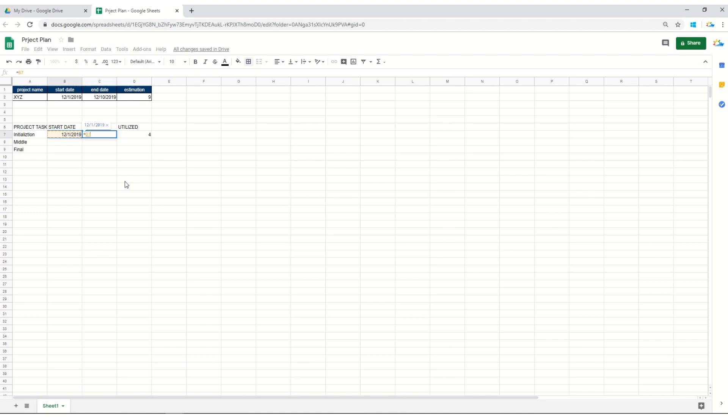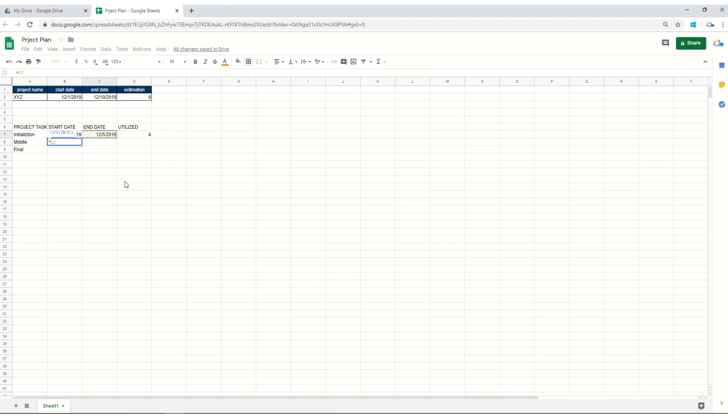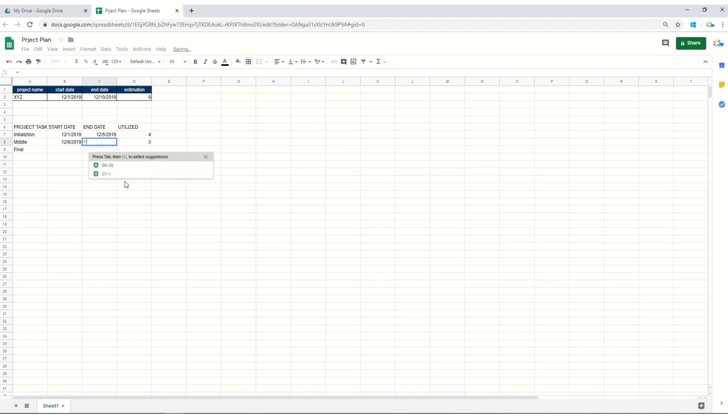Now the ending date can easily be calculated through simple math, which is the start date plus the utilized number of days. Now the start date of the second project task is actually the end date plus one of the end date.